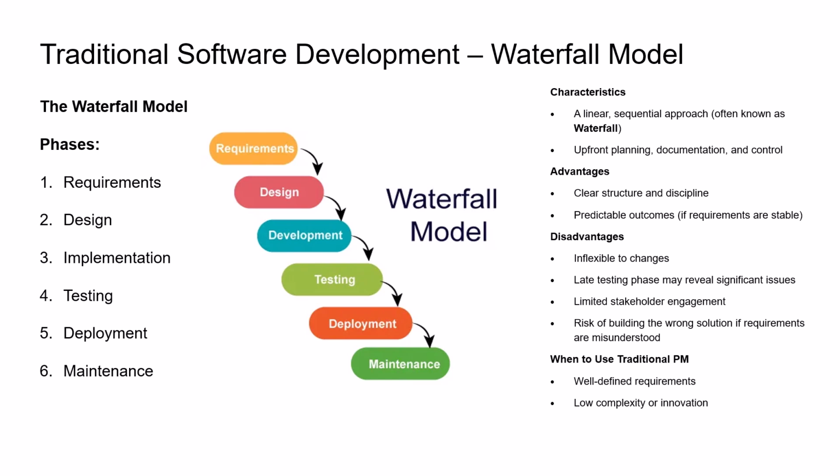As you see, there are some advantages and disadvantages in this model. This one has been used for a while, and it's kind of an old way of developing software now. The bad thing about this model is that you cannot do things in parallel. You have to finish the requirements, and then you go to the design, and again you have to finish all the design for all of the requirements, and then after that you do the coding, etc., etc.